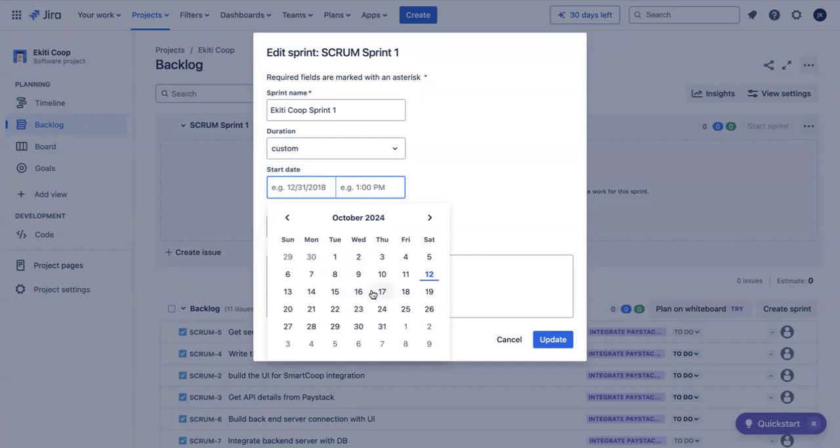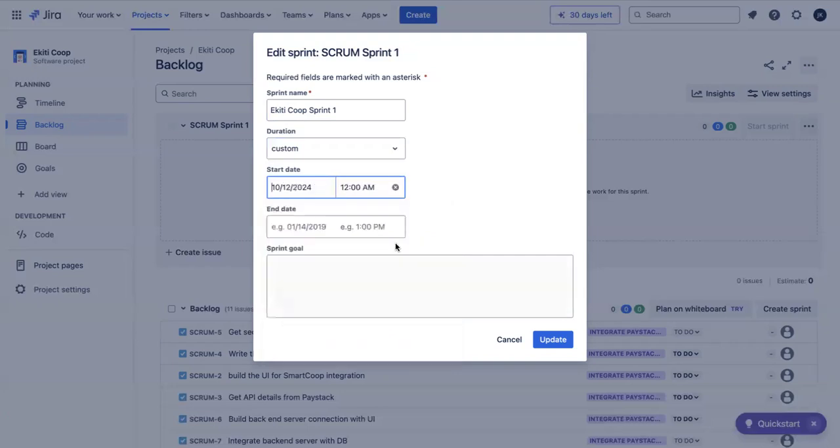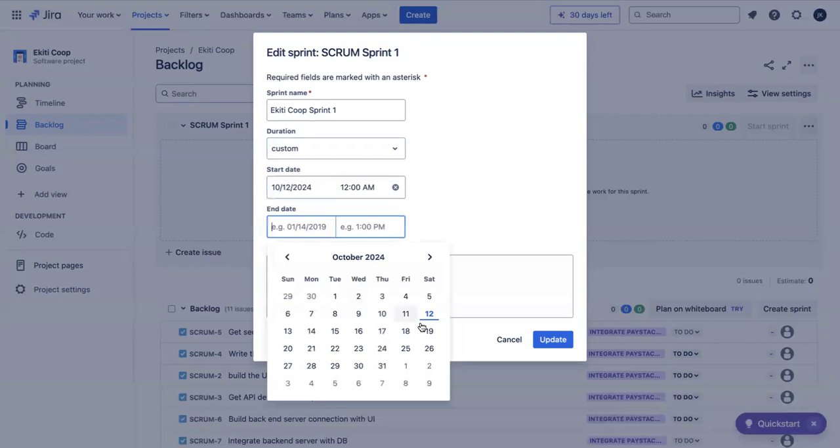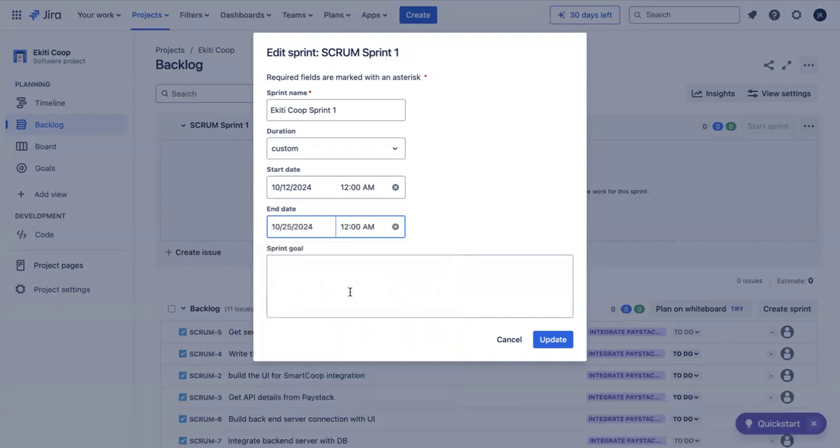So let's say we switch, but we are starting today. So if we start our own sprint today, we can move from a Saturday to a Friday, right? So if I choose this 12, I have to adjust the time to 12 a.m. And then I can say we're running a 2-week sprint, means by 25th Friday, that will be when our sprint 1 will be over.